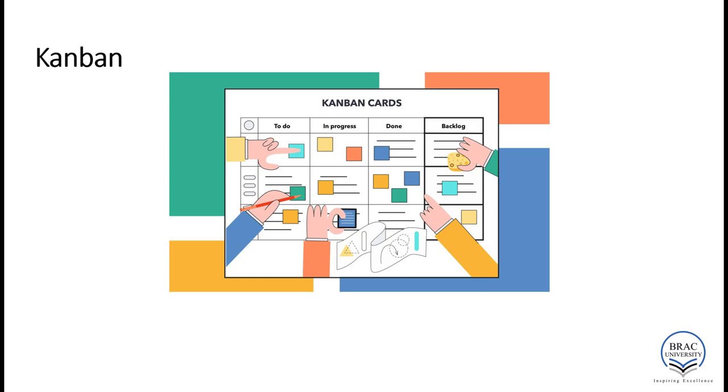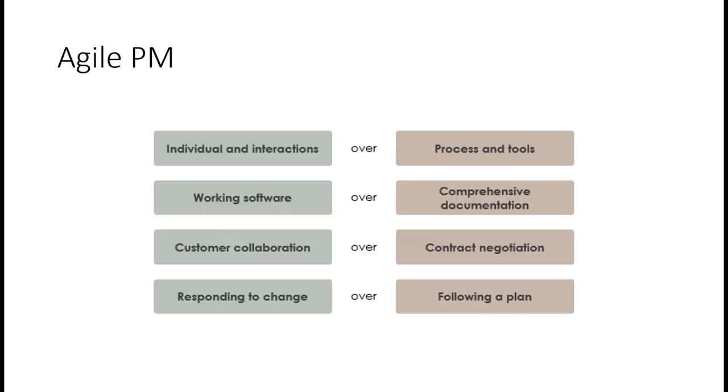Well, it's traditional to make Kanbans on a wall or whiteboard, but you can also create electronic Kanbans using a spreadsheet, or these days there are lots of specialized software as well. In order for Kanbans to be useful, they need to be accurate. So the tasks need to describe the things people are actually working on, and the status needs to be updated very frequently. Another project management tool is called Agile, and Agile has actually become a manifesto.